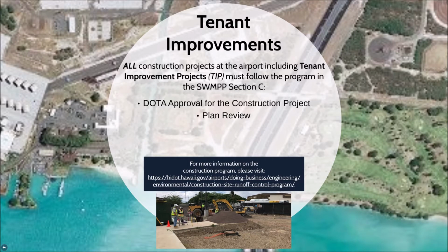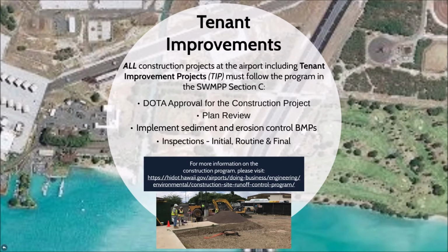Once a plan is approved, the DOTA Environmental section will perform an initial inspection to ensure that the stated BMPs have been properly implemented. Construction work shall not commence until the initial BMP inspection has been conducted and approved. Throughout the duration of the project, the DOTA Environmental section will conduct routine inspections to ensure that BMPs are maintained. When violations are noted, DOTA can issue enforcement actions and increase the frequency of inspections. Consultation with the DOTA Environmental section is required if construction is planned for your facility.